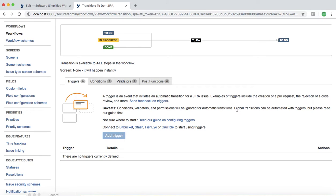Examples of when triggers could be used: as soon as a developer creates a pull request or a code review is rejected, the Jira issue will be automatically moved from one state to another — the trigger initiates that movement. For example, if a code review has been rejected, the reviewer doesn't have to manually move the issue back and reassign it to the developer. The trigger is set so that as soon as the code review is rejected, the issue is automatically moved back and assigned to the developer.